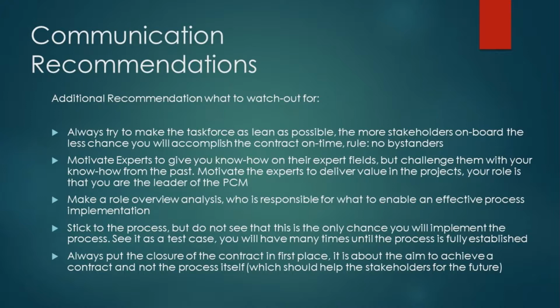You want to have one person, and this is really to keep in mind, who is the expert in a field. For example, you have the legal expert, you have someone from the primary unit, for example, for all the topics of demand planning, business case development, etc. And you have yourself and a vendor spokesperson. So you need a spokesperson from each party in order to have a lean team and a lean task force. Why? First of all, it's easier to coordinate tasks. It's more efficient. Second, you will also have an easier communication towards the sponsors.